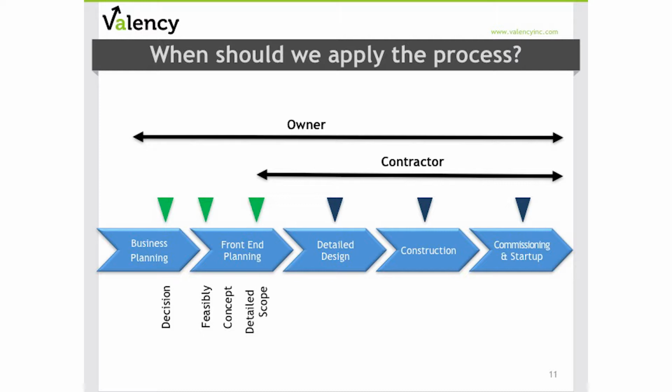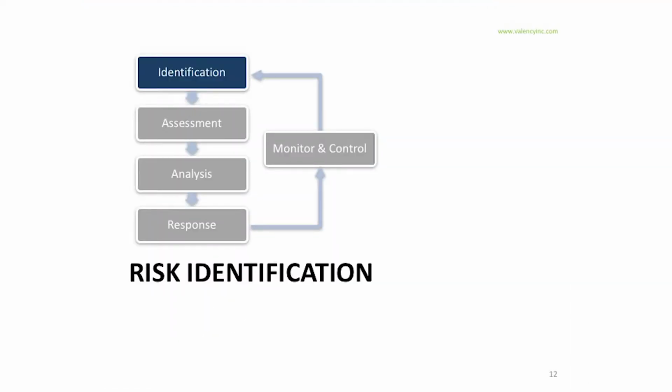As your project continues into the execution phases, we recommend planning a risk workshop early in the detailed design, the construction, and again at commissioning phase. An important consideration we need to talk about is introducing the risk workshops that may represent a significant change in process for small and mid-sized project teams. Everyone is pressed for time, and we need to expect that we're going to get some pushback as we introduce yet another potential meeting in your project process.